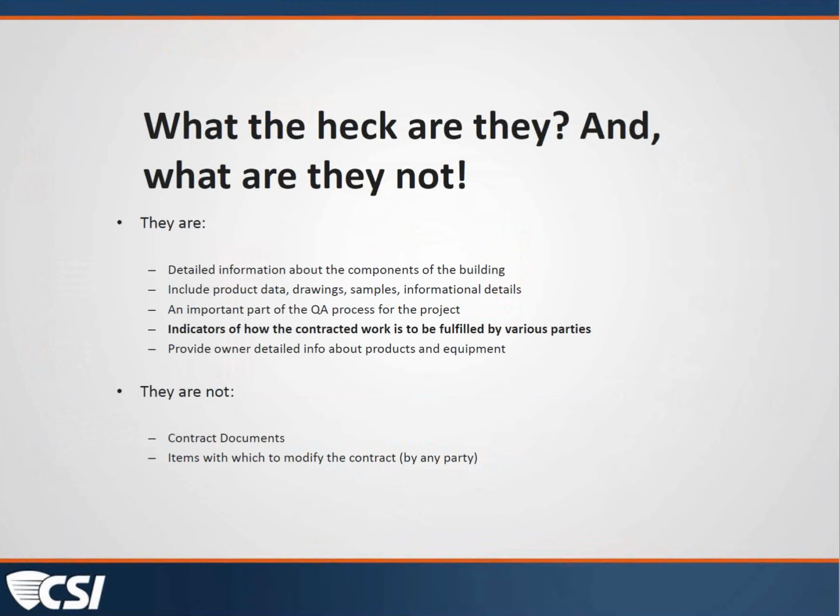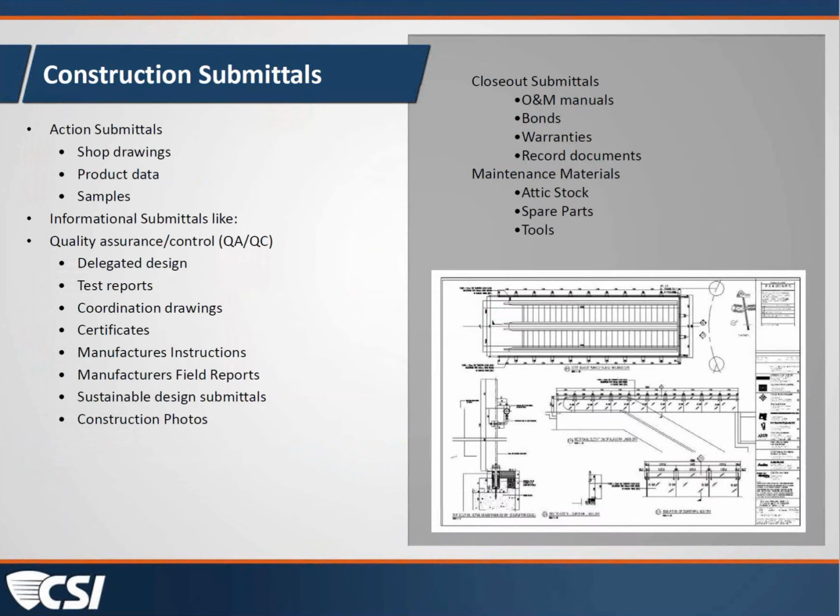That's right, Doug, and this is where I think opportunity for litigation mistakes get made in actually taking those submittals and making modifications, and perhaps the best intentions in thinking that that's the right place to do it. But as Doug pointed out, there are three ways to change the contract documents, and it's not on the submittals or the shop drawings. And if we go to the next slide, Matthew, I think there's a list of a lot of documents that we're talking about here